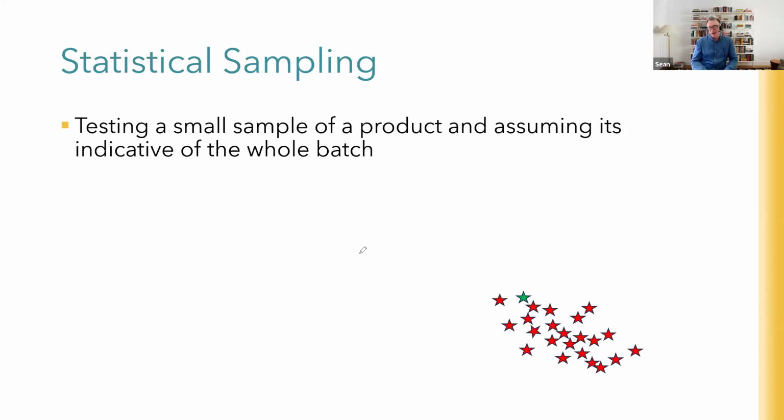But maybe you've got 1,000 lines of code, and maybe instead of reading every line of code and testing it, you actually just choose bunches of 100 lines or something like that and test that, and sort of go, well, we do write code pretty well, and therefore we're not expecting any bugs. So statistical sampling is a great way to do it.